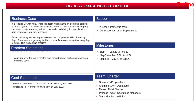The next thing in the case study was that the team created a project charter. This project charter has six elements: the first is the business case, second is problem statement, third is goal statement, fourth is scope, fifth is milestones, and sixth is team charter.